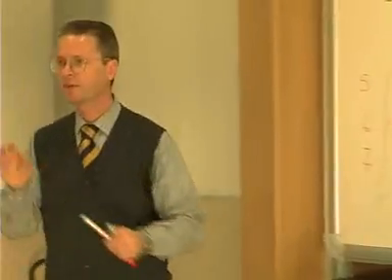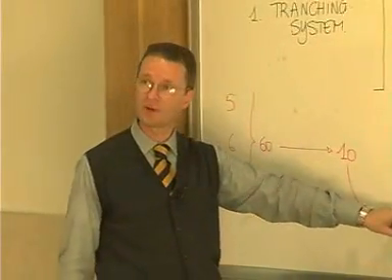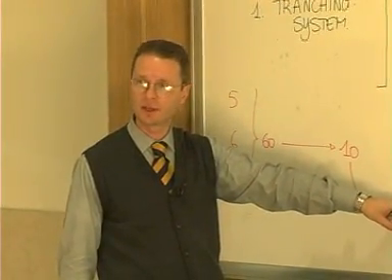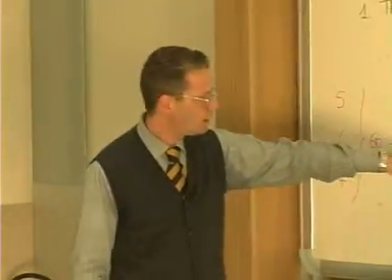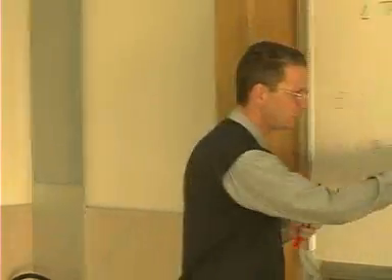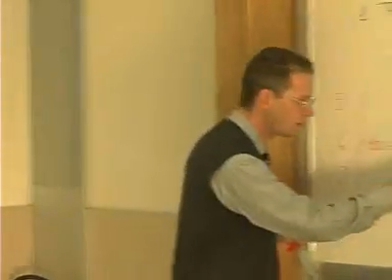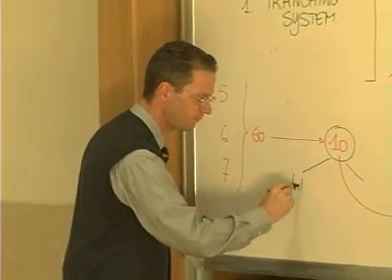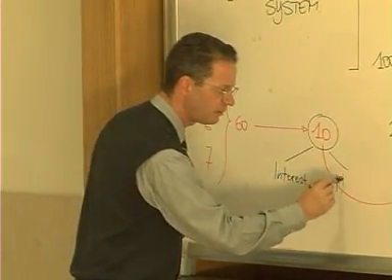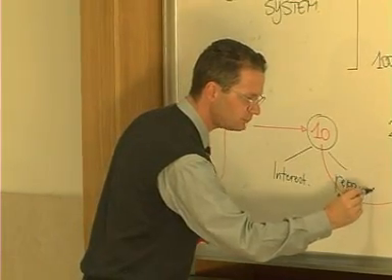Just one complication on this reasoning, and the complication is very simple. Since the value-added tax facility is yielding interest to the banks, the amount of 10 must be split every year in terms of interest and repayment. So, this amount of 10 will not be deducted as a rule from the amount of 200, because you have to take into consideration that the value-added tax facility yields interest to banks.